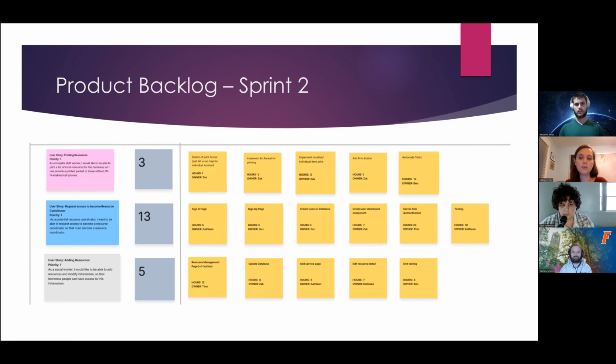In total, we estimate we will spend about 124 hours completing these tasks during Sprint 1. Although this is 4 hours over our estimated capacity of 30 hours per person, we expect that some team members will need less time for knowledge acquisition than others. These individuals will take on some of the longer tasks in the sprint. In addition, team members whose total hours are less than 30 will be able to support other tasks once theirs are finished.